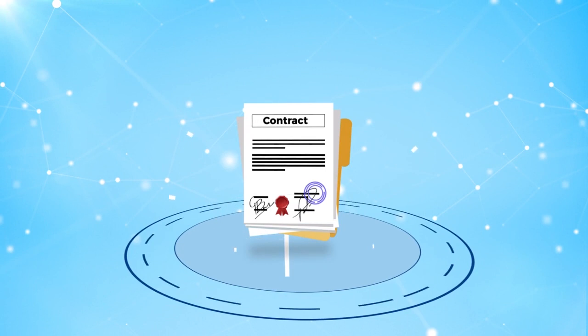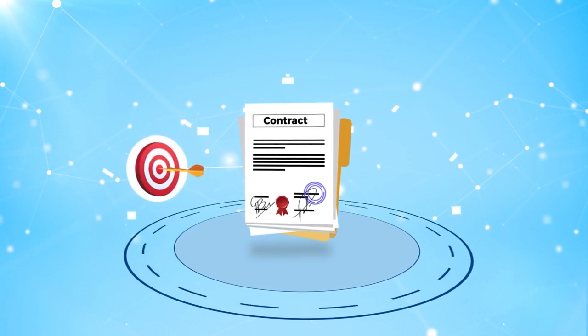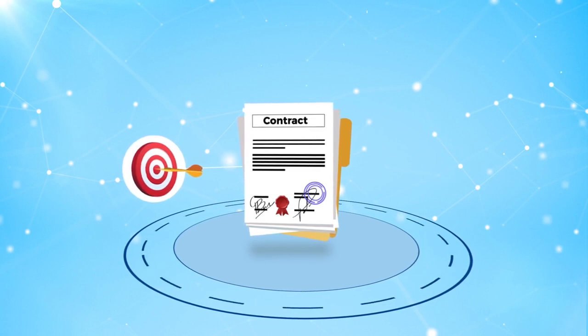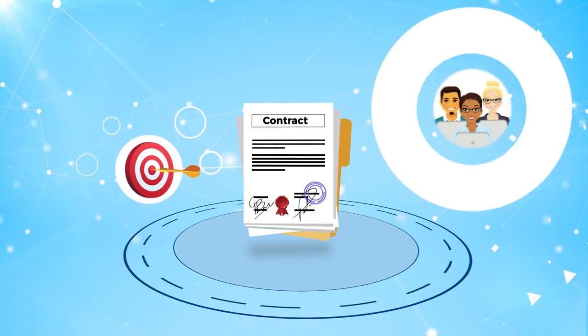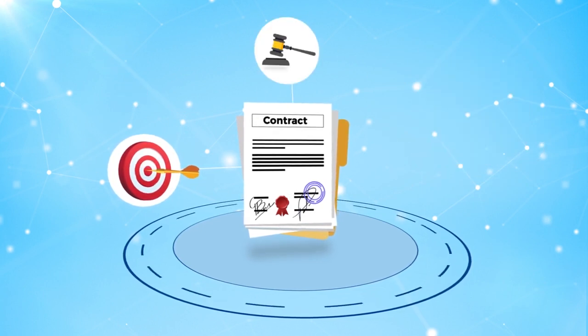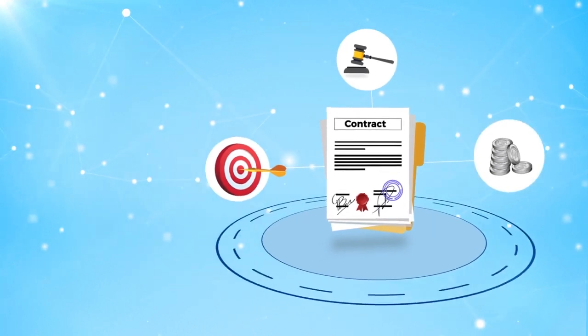In theory, a possible solution is for a contract to specify the overall business goals that a project team must enable a customer to meet, instead of specifying detailed technical requirements. However, this isn't always practical because in terms of legal requirements, business goals need to be defined in monetary terms, which can be difficult. So what types of contracts are suitable for Agile projects?